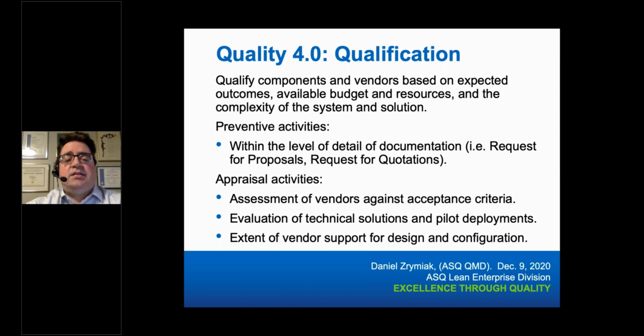And it's by having this early buy-in that sets things up for more broad acceptance. Alternatively, if the pilot reveals risks, then at least those risks can be contained. For example, you're not putting the whole enterprise or the whole product portfolio at risk from a bad pilot. So this is an extremely important issue that not only provides a reference base for ongoing deployment, but also, if something is not a good fit, it's an early indicator that you can make a quick correction.